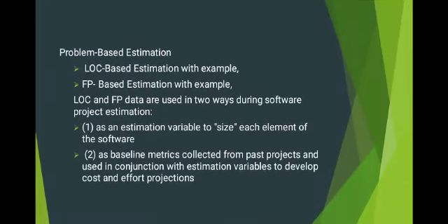Problem based estimation can be done using LOC based estimation and FP based estimation. LOC and FP data are used in two ways during software project estimation. First, as an estimation variable to size each element of the software, and second, as baseline metrics collected from past projects and used in conjunction with estimation variables to develop cost and effort projections.